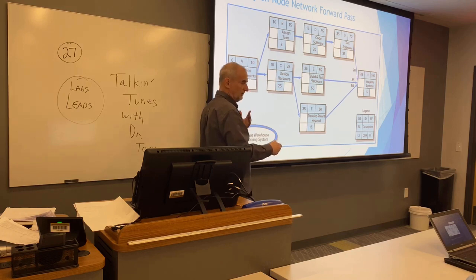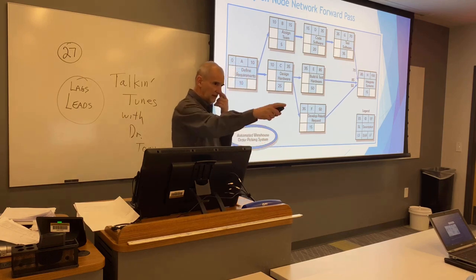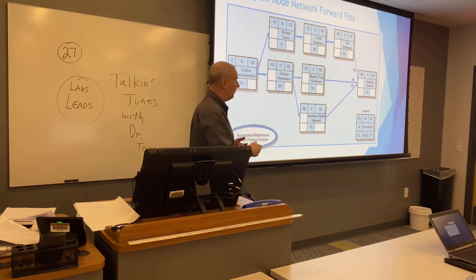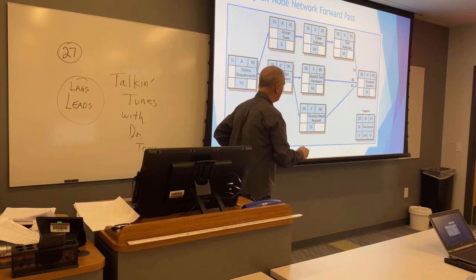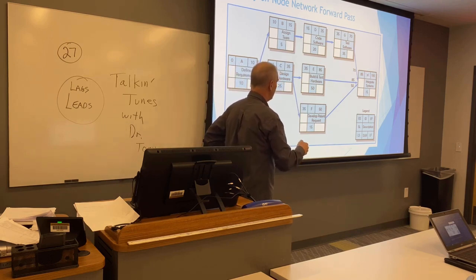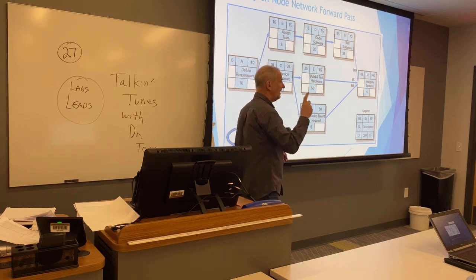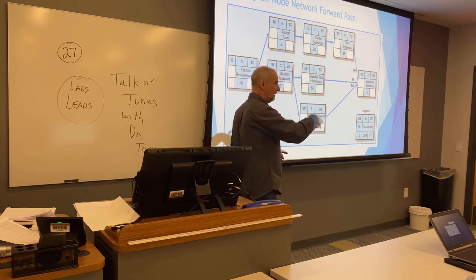This is really gonna determine if you've been following me. Kenny? It wouldn't equal 100. No? Why can't I put 70 here? Ethan? H is dependent on E, so E has to be done before H can be started. H is dependent upon E, F, and G, right? Oh. And so I have to go with the latest, earliest finish.